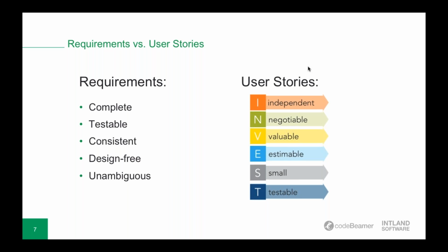Only they come later in the process, not at the beginning. That is the only difference. It's all about how you define your internal processes. Our user stories and change requests are then further decomposed into specific development tasks, each with a well-defined DoD, which stands for the definition of done.